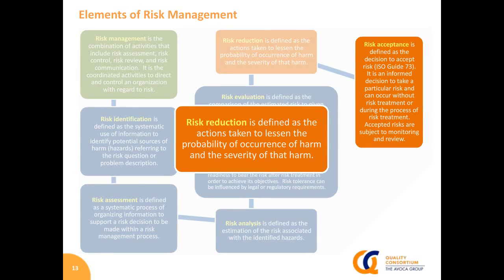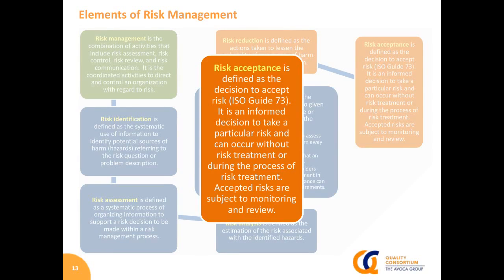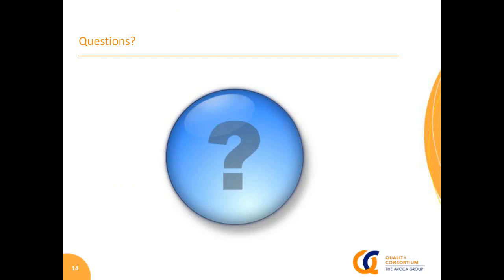As a result of that, then you begin to do one of the following two activities. You either then argue and develop risk reduction, and you manage that proactively from a very aggressive perspective, or you acknowledge the risk acceptance. And as I said, if you accept it, it is excellent to be able to document that it was aligned through leadership up and down, and then also to put it in whether it's trial master files or other aspects, so therefore even later on if you happen to be inspected, it shows a thoughtful approach to why that risk was accepted, and that it had a low risk of patient implication or low risk of other data quality perspectives. Even if the risk actually becomes an issue and you had to be reactive to address it to some extent, then it still helps the organization and others understand the thoughtfulness that went into that.